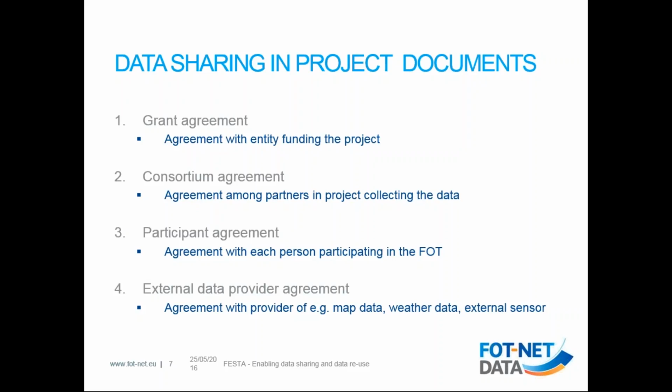Maybe the most important one is the consortium agreement. It's an agreement among the partners in the project that collects the data, and there you actually set the possibility to share the data both within the project and also after the project. You have the participant agreement, and I think that many of the participant agreements earlier did not really take this into account.